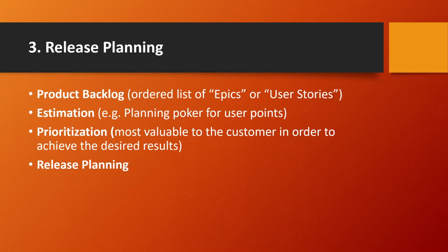So from the epics to the stories, but not into super detailed stuff. Point number 2, estimation. So we have a list of features that we described as user stories, but now what we want to achieve is to estimate the discrete items of features using different techniques. Here I named planning poker as one of the techniques, but what this technique basically ensures is quick, reliable results based on expert opinion and analogous sizing.